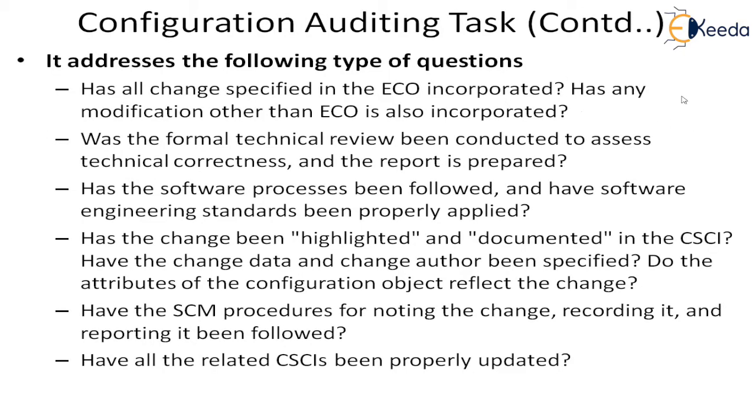It addresses the following types of questions. Have all the changes specified in the ECO, the engineering change order, been incorporated? And is there anything else that has been incorporated? Only those changes should be incorporated. It is like a necessary and sufficient condition, so nothing extra should be done. Has any other modification also gone in? Was the formal technical review conducted to assess technical correctness, and was a report prepared?